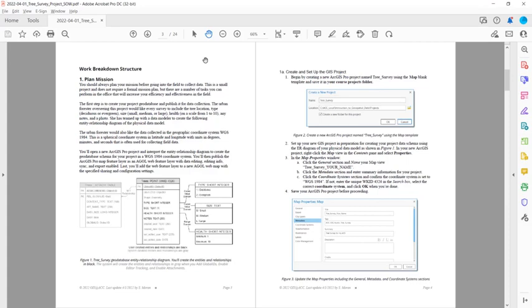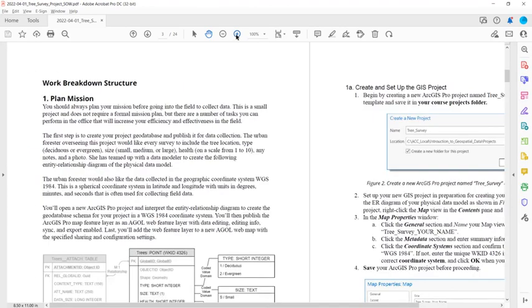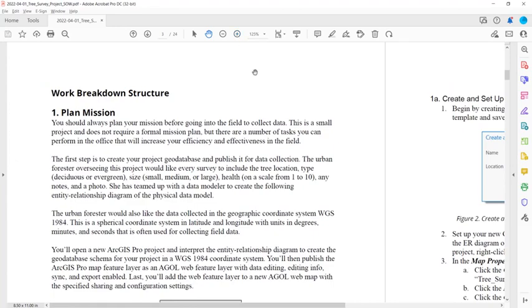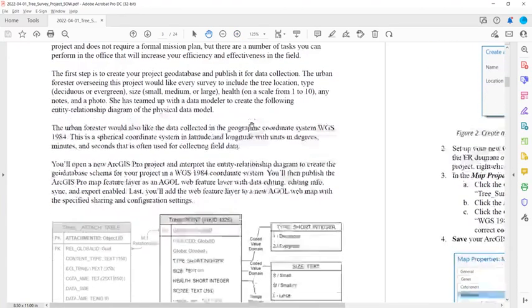The first step is to create your project geodatabase and publish it for data collection. The urban forester overseeing this project would like every survey to include the tree location, type, size, health, any notes, and a photo.